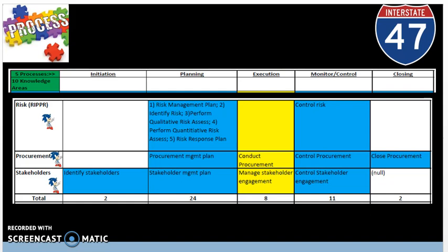So let's move forward. After having assigned document and contract, the next step is to monitor and control to see if the contract is working out in the favor of the project team. As project managers, we take in the procurement management plan, selected sellers, contracts, and use procurement performance reviews to see how well the seller is performing to meet the objectives laid out in the contract or agreement.